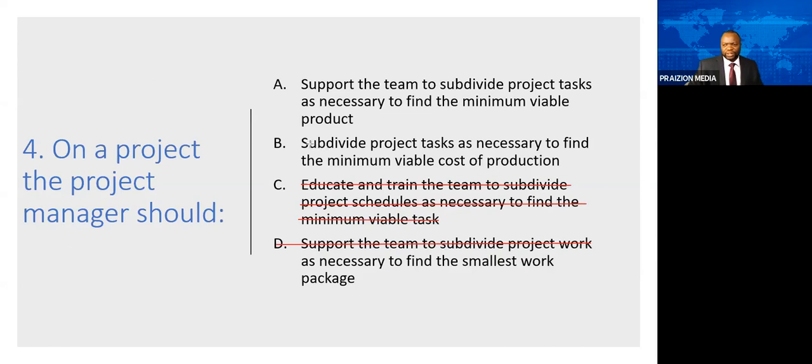B, subdivide project tasks as necessary. Think about it. Do you really subdivide tasks? It's already a task, which means it's been broken out from a work package. So if you were in predictive world, would you subdivide a work package, a task, into something else? We could. We could say we're dividing tasks into a subtask. When do we do that? When we don't have a full understanding of resources. But it said in the second phrase, minimum viable cost of production? No.